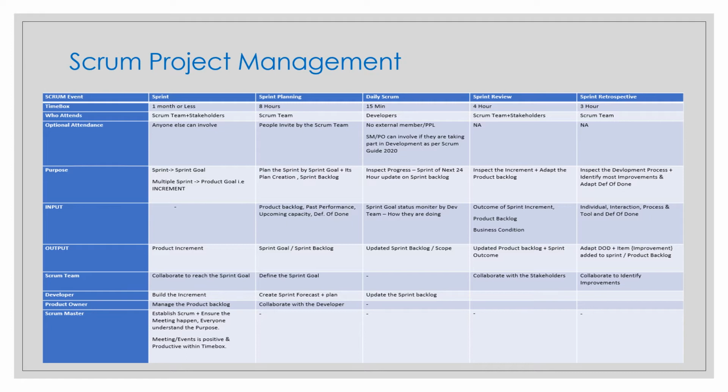When the product owner gets the requirement, the larger item is called an epic in Jira, or in Azure DevOps, anywhere. That larger item is divided into smaller pieces, that is your user story and the task. Only the term is different.